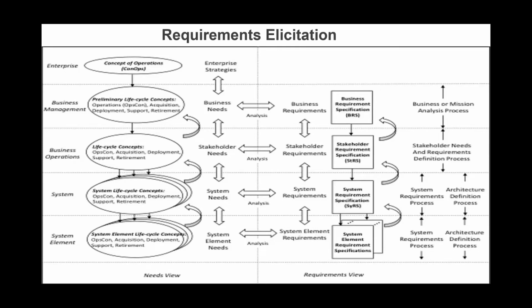So it's basically identifying the stakeholder needs that dictate the course of action, and that drops down into system elements or system requirements. Once system requirements are identified, they are sometimes drilled down into your contracts. Contracts will have much more information than system requirements, and sometimes contracts lead the system requirements, form the system requirements, and then you derive your subset of system requirements based on those contracts. But you need to always do a system requirement specification, an SRS baseline, because without it, you won't be able to track the changes made after that.